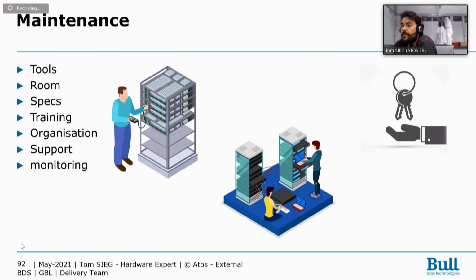He has to know which tool is useful for each manipulation. You have to have tools on site, a specific room, specific components. If he needs some spare kits, spare components, it's the same. They have to be delivered. Trainings, it's also the moment that the provider will train people, like we did, for example, in Senegal, where the cluster was not totally finished, but training on how to use it, how to maintain it, etc.